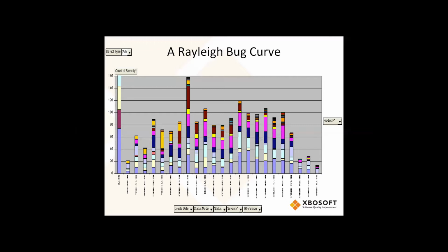Another might be the experience of the team. So if you have people that are fairly new and have a large learning curve, they might have more bugs in the code that they would then have to find and fix and test, as opposed to a team that's highly experienced, highly skilled, and really familiar with the application, and they tend to write cleaner code right off the bat.